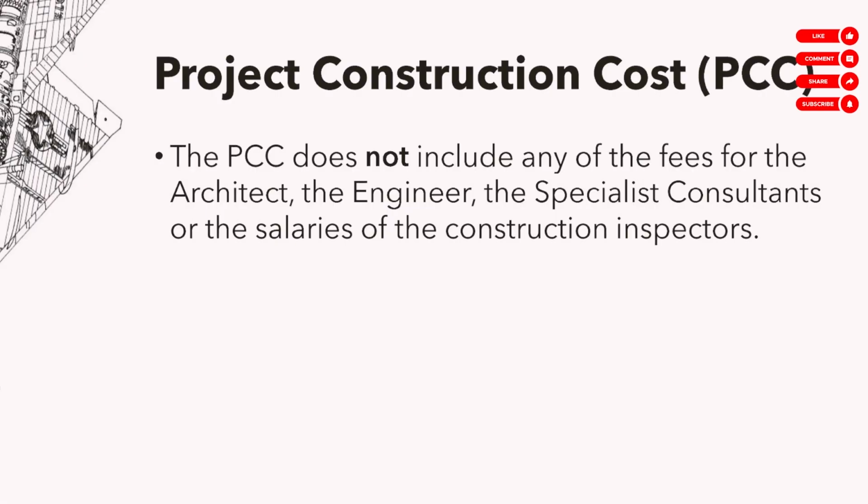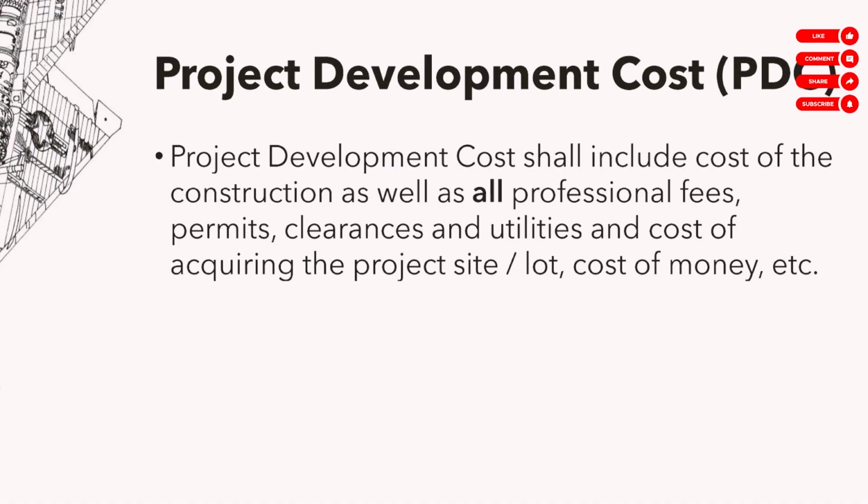Okay. Also, the PCC might be easier to understand if we tell you kung ano yung mga hindi kasama sa PCC. Hindi kasama sa PCC yung consultants' fees, yung cost ng lote, yung cost ng construction inspectors kasi we treat that as parang consultants' fees. If you want to include those things, lahat ng gastos, including magkano yung lote, magkano yung permits, magkano yung professional fees, then you can do that, combine everything. The amount though is called the project development cost.